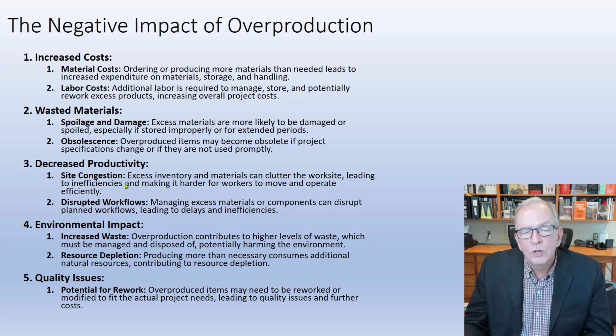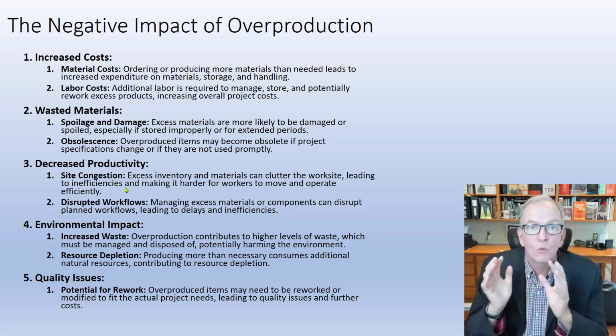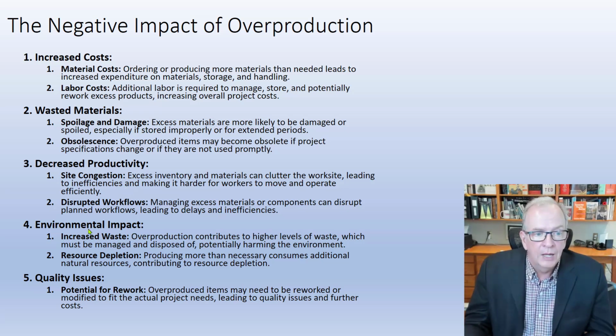Basically, that's going to decrease your productivity. I always put it to you like if you had to paint a room and it's empty, I like doing that. If you have to paint a room and it's filled with furniture, I don't like doing that. It's harder. It's not that you don't ever have to do it, but it's definitely a lot more difficult to do. And it slows you down. So it definitely decreases productivity.